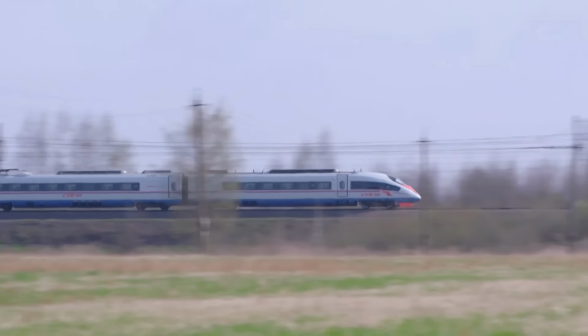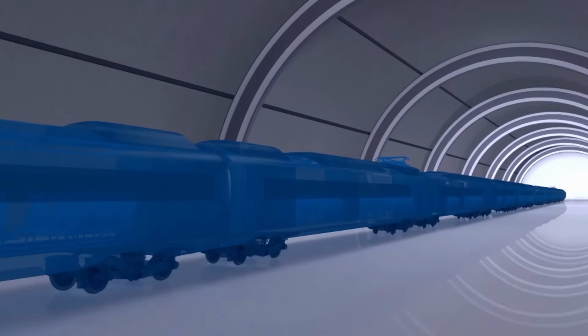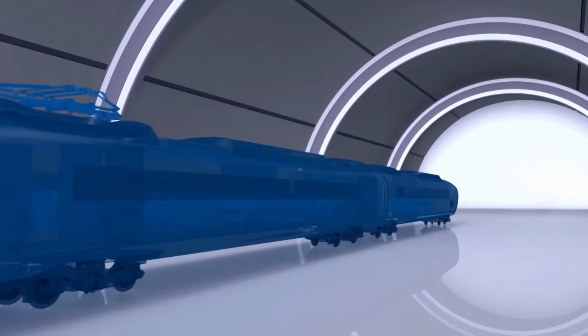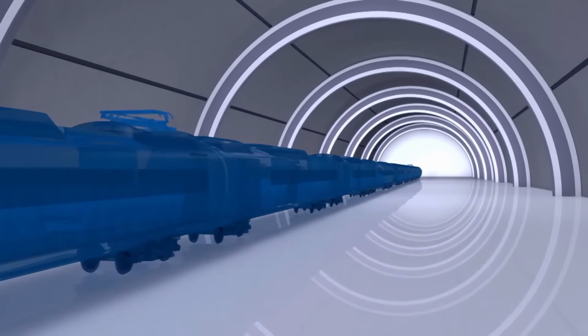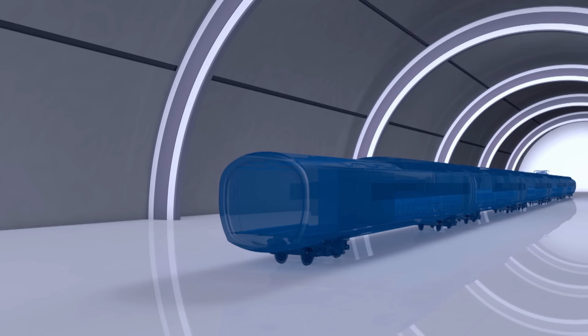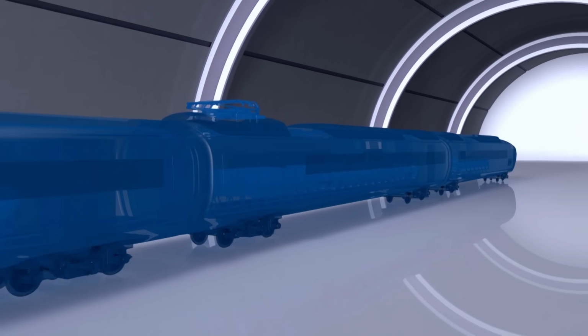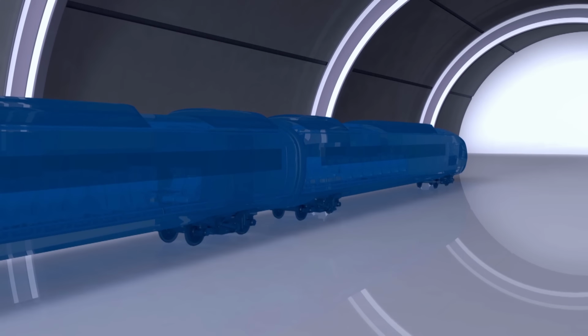After 3.7 million kilometers, every Sapsan needs a mega pit stop. During what's called an R3 revision, engineers overhaul the entire train. To accomplish this within the 34 days they've been given, they have to separate it into two halves and work in parallel at two different stations.